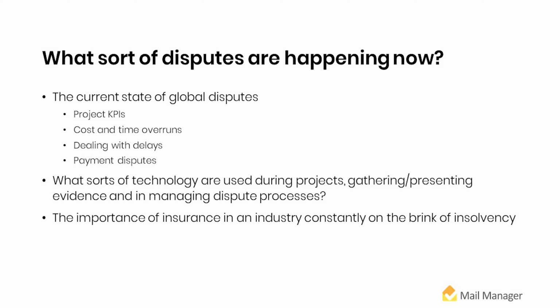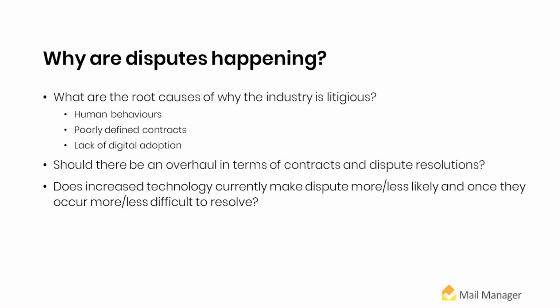So, May, can we contractually obligate people to be collaborative, or are there other more pressing mindset issues that we need to overcome? I think you can, and I've always suggested people do this, and there's a couple of ways of doing that. For example, saying you have to meet, or virtually at the moment, and talk to each other once a month. And that sounds really silly, that you have to tell people to do it, or you have to exchange information every 2 weeks, and this is the information you have to share. And over time, from my experience over the years, you force people to collaborate and talk to each other, and they realize actually it's a better way of being, and then they do it naturally. But if you don't put in the contract that you have to talk to each other once a month, then people may or may not. So it's building into the process.